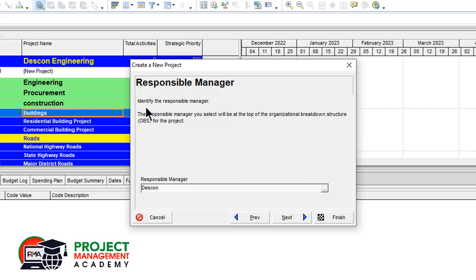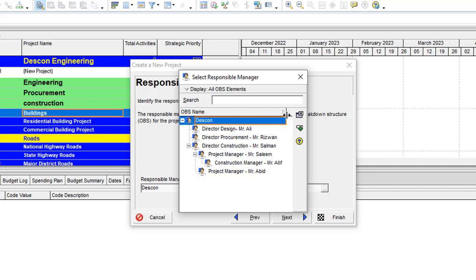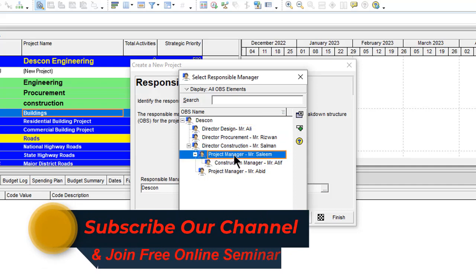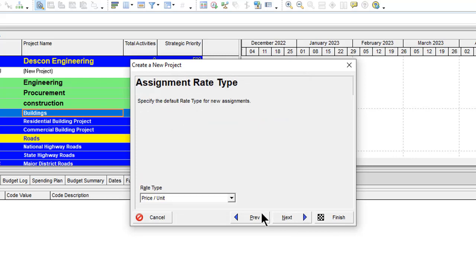Next is the responsible manager. The responsible manager you select will be at the top of the OBS — Organizational Breakdown Structure — for the project. Click the search button; here you can see the OBS entries. If you want to learn how to create OBS in Primavera P6, check my other video — link in description. Double-click on Project Manager, then click Next.